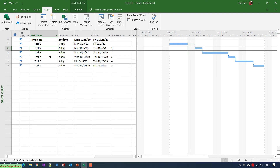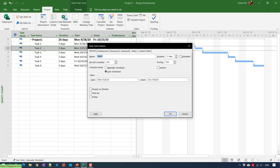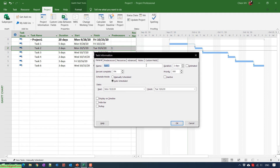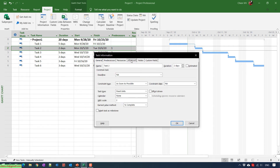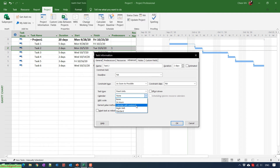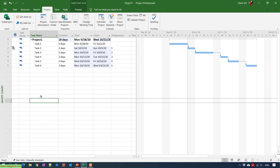Now I want to add the weekend — Saturday and Sunday — for task number two. Double-click on task number two to open Task Information, go to the Advanced tab, and navigate to the Calendar option. By default it is set to None, which uses the default Microsoft Project calendar. Click on it and select 'Calendar with Weekends', then click OK to apply the change.